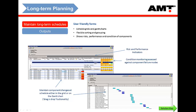This is really important to understand, especially in the last three or four years of a contract. For example, if this red item shows 8% RIVIC, that tells the planner there's very little life left on that component at contract end — so if you bring it forward even slightly, you're probably bringing in another engine within the contract term that you're not currently forecasting. Conversely, if the RIVIC is at 95% and shown in green, you've got almost a brand new engine at contract end, and if you can get a bit of extra life, you might save the cost of that engine — though it depends on the specific terms of the mark agreement.